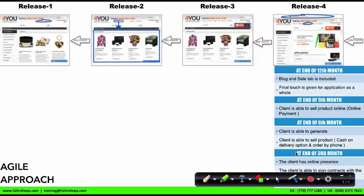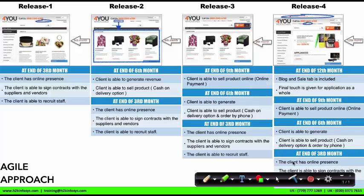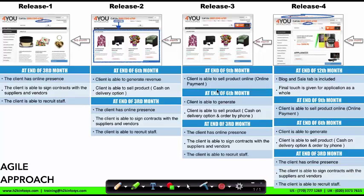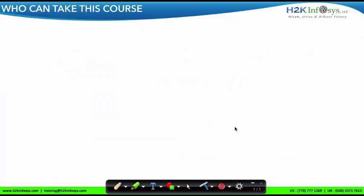Let's see the overall development of the project. Instead of making the client wait 12 months as in the traditional approach, here in Agile we put effort to give early benefit to the client by developing the software incrementally. This is the concept of the value-driven approach in Agile.